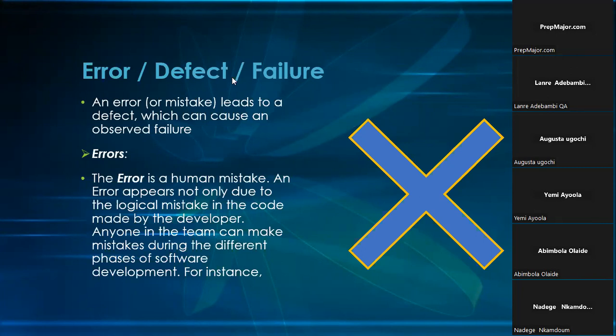And that's why you always ask questions when you're doing your sprint planning, when you are coming together. Once you have picked a task, this is what you're meant to do. If you don't know what you are meant to do, if the story is not well explained, if it's not broken down, if you don't understand the acceptance criteria, please call it out. Excuse me, BA, I don't understand this. Can you break it down? What is expected? You have said that we should be able to log in. If I want to log in, what are my criteria? What are the valid things? Please, can you add acceptance criteria there? All those questions you should be asking when it comes to you talking.